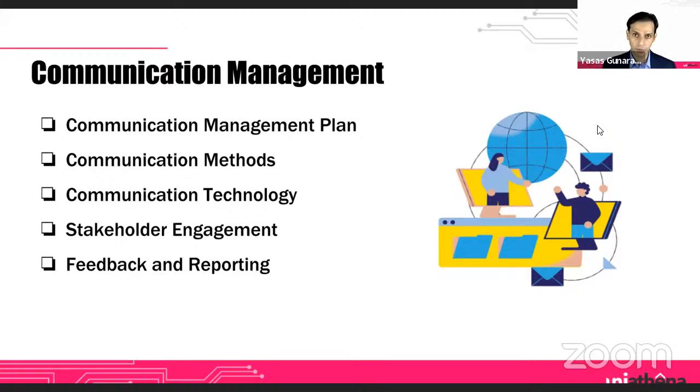You may have templates for it. You may define, okay, how do we manage emails? Who should we send emails to? Who should we copy in an email? Should the whole team be copied in an email? Should it be always addressed to the project manager? Should it be addressed to the customer or the key stakeholder? Right? That would be clearly defined in a communication management plan. You would be told what tools to use, how to use, what templates to use. So a good communication management plan would have all this defined and explained across the team.